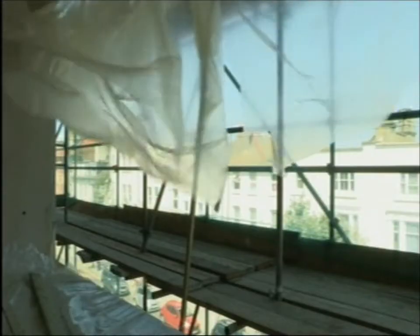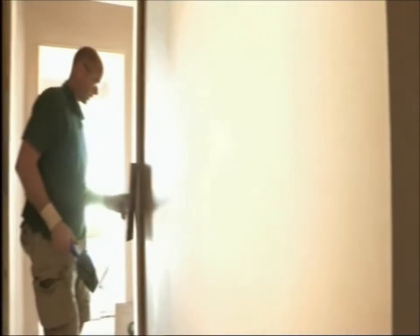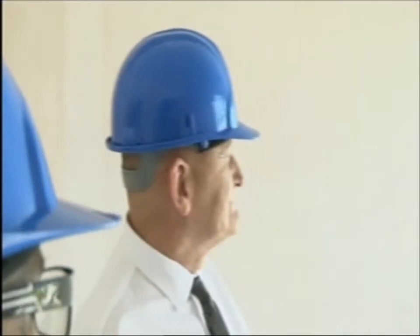This is the bedroom. Yes. It's flat number 6. Right, I'm with you. And apart from the front of the building, it looks nearly finished. It would seem that there's been a lot of money spent on this. Yes, the carpenter will start from tomorrow. Brilliant. To put in the kitchen and the second fixing. Yeah, and then they will do the mist coat and start painting, and then we'll put in the skirting and doors.